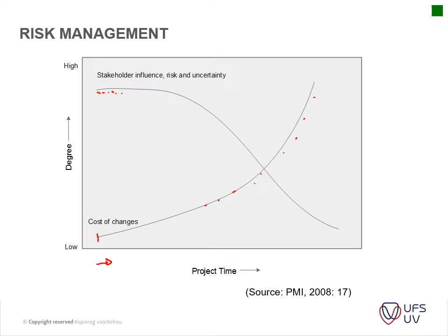That type of information you need to gather, and here, does this person really have the funds to fund this project? Is there a communal buy-in into this development or not? That's the type of risks that is involved, and that lessens as the project goes down. The more information you get, the less that risk becomes.